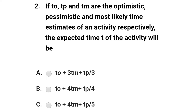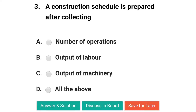The first question: if t0, tp and tm are the optimistic, pessimistic and most likely time estimates of an activity respectively, the expected time t of the activity will be — option A: t0 + 3tm + tp divided by 3; option B: t0 + 4tm + tp divided by 4; option C: t0 + 4tm + tp divided by 5; option D: t0 + 4tm + tp divided by 6. The correct answer is option D: t0 + 4tm + tp divided by 6.